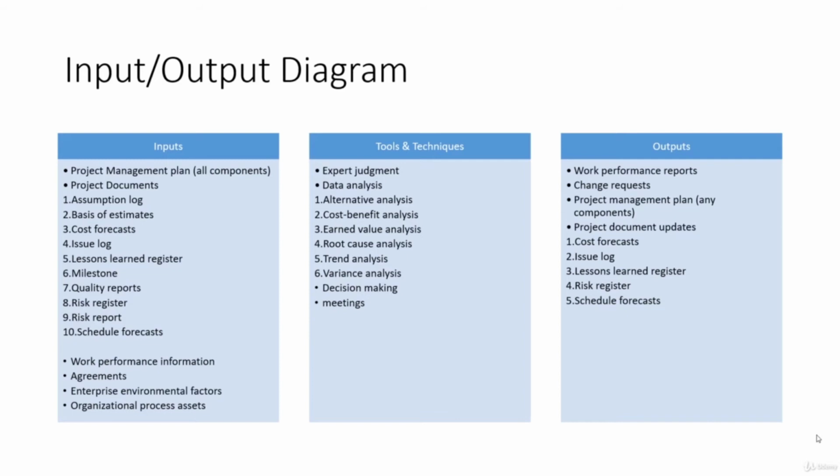So that is your risk status, the overall risk status. And it can have individual specific items, like I was talking about, the dependencies. So if some dependency is not being delivered, that is part of your risk report. And then we have a similar forecast for schedule like cost, where we use tolerance based on the past performance as input for the current project.